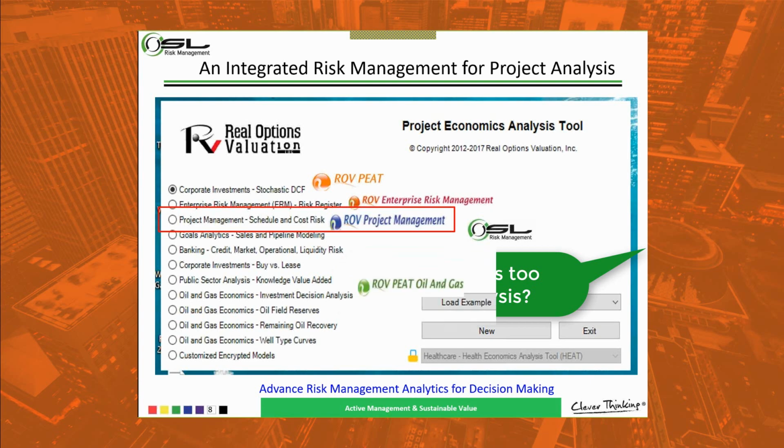And actually, the information you are going to get there is not really stable, because you are working in the really narrow interconnection milestone of the activity. Right now, you are changing the paradigm a little bit. It's a paradigm shift, because in the past, the detailed plan was working in the deterministic. The single point estimate is more risky than at least working in a range, in a minimum, most likely approach. If you are doing this in the wrong way, in the really detailed plan, that is time consuming, that is cost.